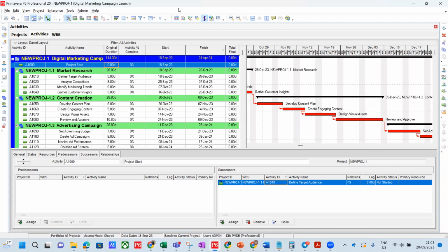During the execution phase, remember the project life cycle, you go through initiation, planning, and then execution. Maybe Jide or Olalekon is a team lead for the design engineer. Just before execution, Lekon will decide who is free, who is available, and who has the best skill set to do that job.